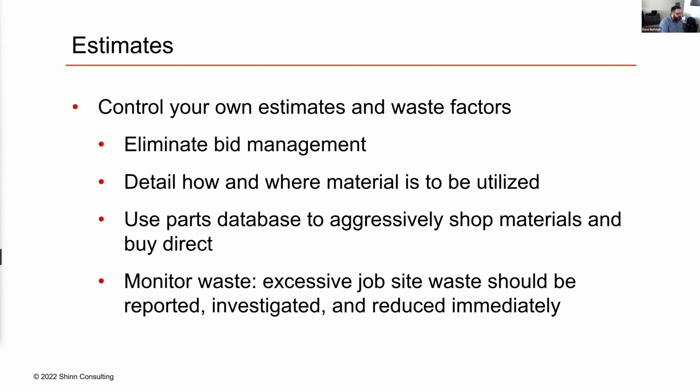I can track trends on, are there certain trade partners? If I have 3 different drywall installers, which one of them, or 2 of them, is more prone to have the extra waste? I want to be able to monitor all that stuff so that, in my purchasing environment, I can have intelligent conversations with the trade partner to explain to them, I still need to lower my cost. And I've noticed over the last 30 jobs that you've done, we've continued to have a problem with waste, or we've continued to have problems with material being misallocated compared to the way that we requested it to be done.